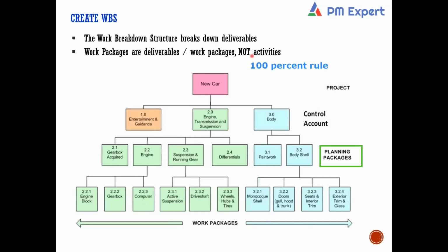Yes, easily, sir. Now, we have discussed work packages. We have discussed planning packages. Now, another thing to discuss is the control account. Right? Now, see, can you see every component in the WBS has a separate code of account identifier? You can identify each component in the WBS with a unique number. Can you see that? Yes. This is called the code of account identifier, right?